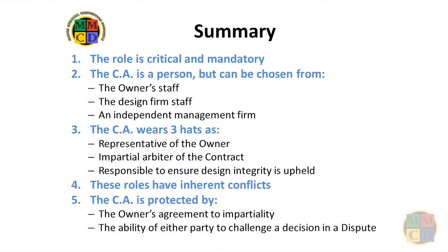So, to summarize, the role of the CA is so critical that the contract should not proceed without one in place. The CA can be sourced from the owner's staff, the staff of the design firm, or an independent third party. Any way it's done, the CA is a single person, not a firm.